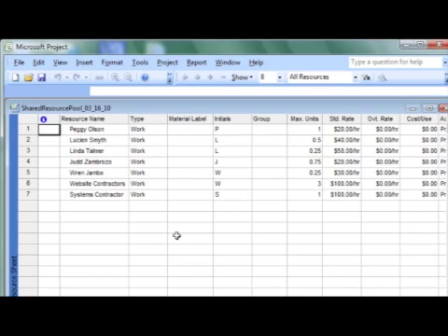After the consolidation is run, we do weekly updates to the consolidated projects. We do this each week to get updated status for all our projects. First, we enter the status reports from each of the team members. Then we run the consolidation of all the projects to determine if we have any overruns that need to be fixed, as well as generate the weekly reports for management and the project team.